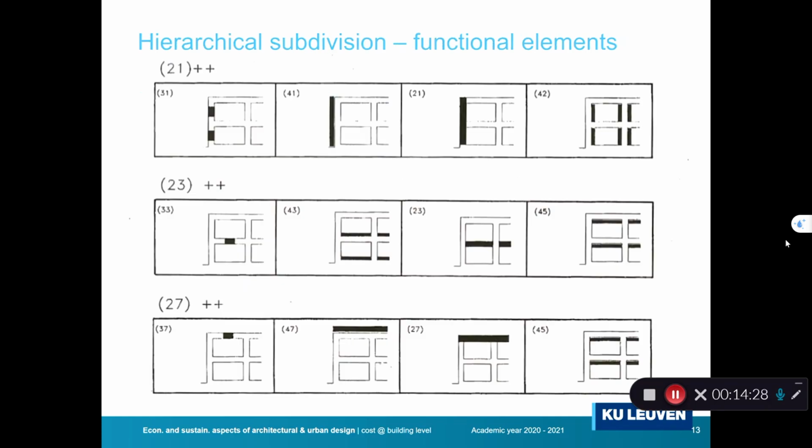So when talking about functional elements at the highest level, we have a hierarchical structure. So here are the macro elements: the macro element of outer wall, of the internal floor, and of the roof, including a price, for example, including the openings even, an average amount of openings. Or we can have more precise costs for the different layers and add them up later on in the design process.